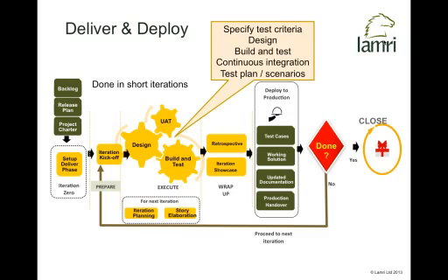So it's kind of, are we fit to actually start going and developing now? Are we ready? And also, what do I need to do to set up my development environments and get them up and fit for working? You might call that an iteration 0 setup phase. And then we jump into executing a number of iterations.